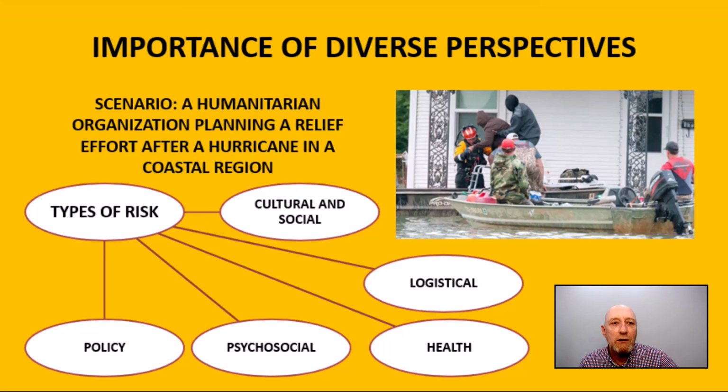Looking at cultural and social, for example, community members can provide insights into cultural practices, beliefs, and social dynamics that can affect the delivery of aid. For example, they could highlight specific dietary restrictions, gender considerations, or the importance of maintaining community cohesion during the relief process.